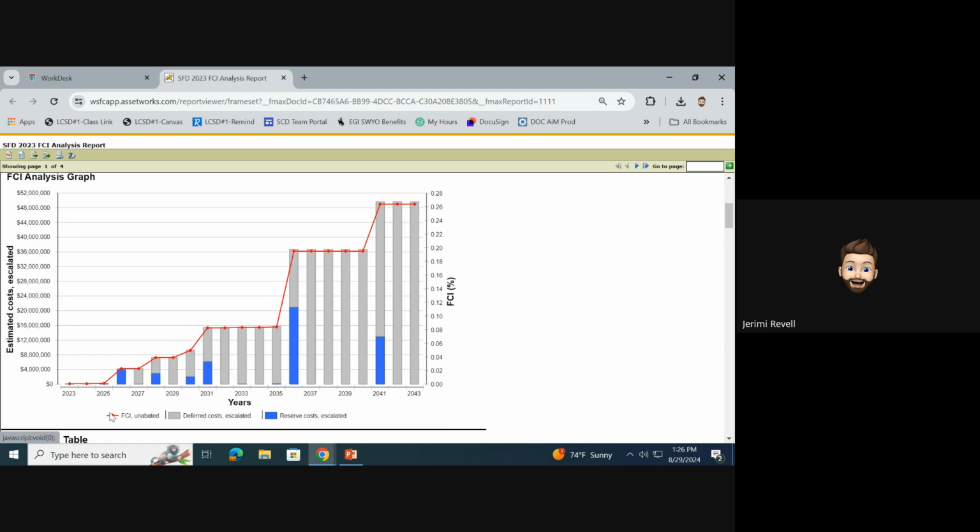Well, I think just so that everybody knows, we used to go off, I believe, a 0.6 for replacement of buildings. I think we saw, in general, most FCI scores drop with this methodology. So we also lowered the bar to a 0.30, which flags for a Mercer study.